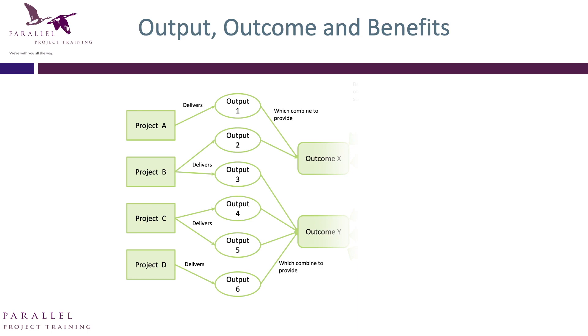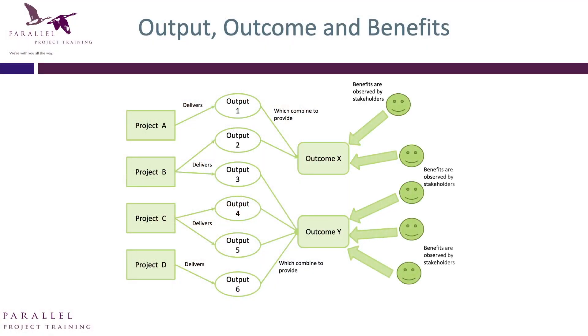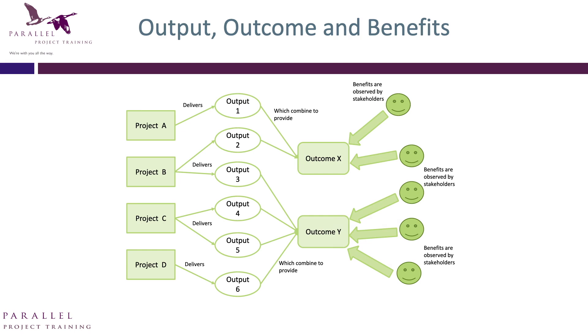The output enables us to achieve a new capability — a new thing we can do. So as a result of creating a new school, we can educate our children better, which means grades will increase. That is an outcome — the change in society we see as a result of putting that output to use. The benefits are what flow to the different stakeholders: pupils get one benefit, local employers get another.